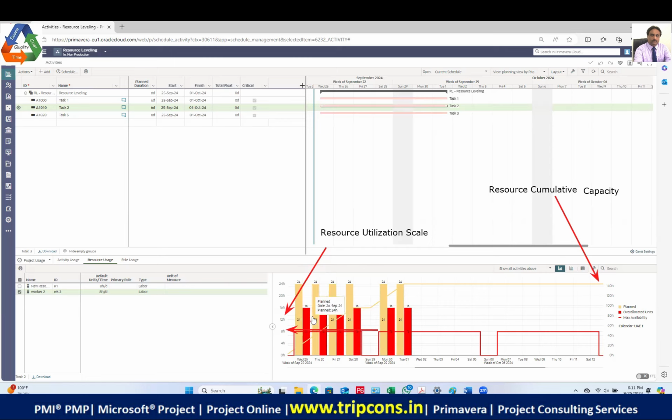What is the over allocation? Basically, the over allocation is 16 hours. Why? Because one person's capacity to work is 8 man hours. Yes. Now, 8 minus 24, how much is that? So guys, you tell me what is 8 minus 24. So 8 minus 24 is equal to minus 16, right? Yeah, right, sir. So what is the minus 16? It is the shortfall.